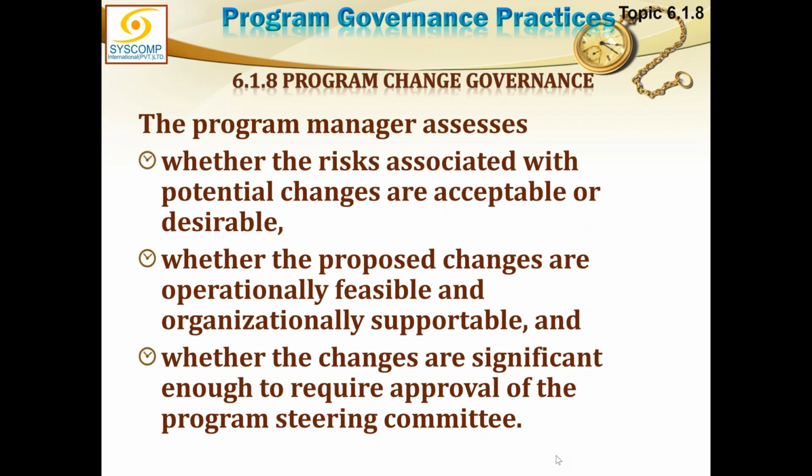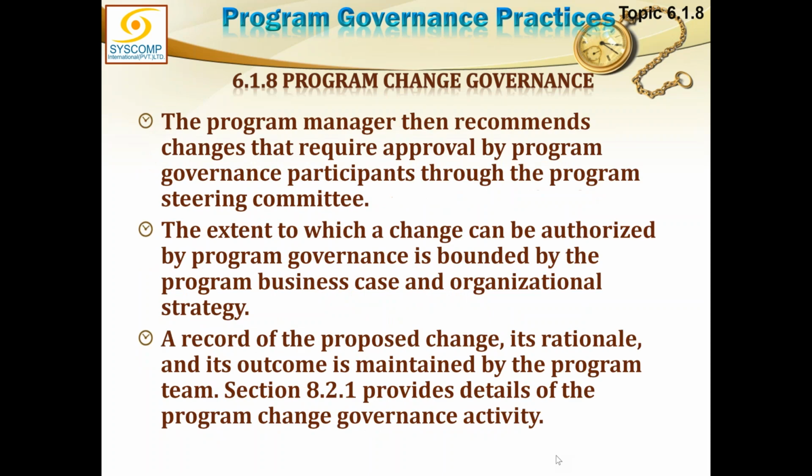But if it is affecting the program structure, then steering committee will have to get involved. And program manager is responsible for ensuring all these points before he can put up his recommendations to the program governance board. Program manager then recommends changes that require approval by the program governance participant through the program steering committee. Who are the governance participants?